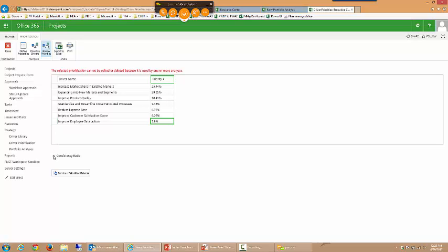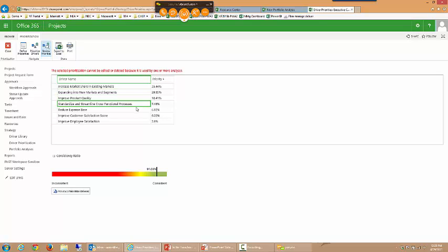Plus there's this nice little thing underneath here. In my opinion, it should just automatically be expanded out so you see that, but you want to make sure that you have a high consistency ratio, hopefully in the 90 percentile or higher. What that means is you were consistent in how you ranked these drivers against each other.